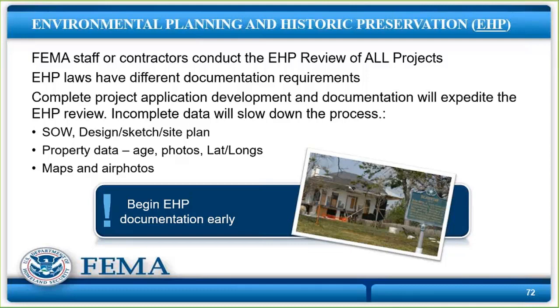You can often, usually, almost 100% of the time, accelerate the environmental review process for a project if you offer to hire the contractor to do the environmental review. Now, there's a lot of projects that don't need a detailed environmental review, that have a categorical exclusion, which we call a CADEX. Buyouts, most flood elevations, a lot of smaller projects, seismic retrofits, unless it's a historic building, they usually don't require a major environmental review. But in-stream work, stormwater management, infrastructure protection projects that involve streams, those usually do.